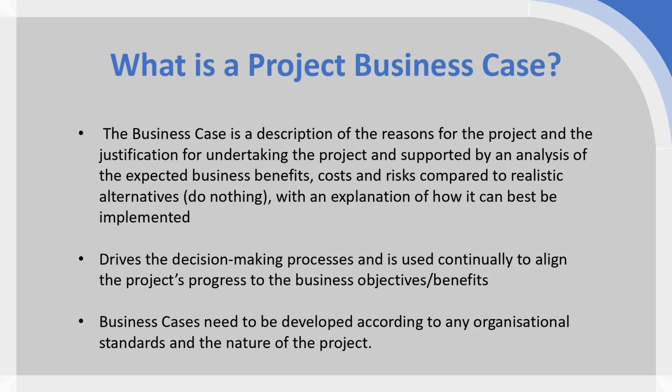To move from that onto the second of the 4Ds model, the design stage, where you start undertaking detailed planning, well, you need to have got agreement from everyone involved as to a particular shape for the project, and that's what the project business case is aimed at achieving. So it's the move from the define stage onto the design stage, from the first stage onto the second stage of the project lifecycle.